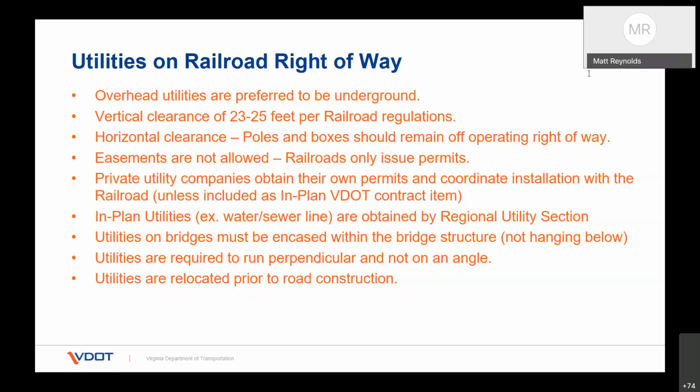until Norfolk Southern relented and gave us an exception in that case, but made it clear that we would never be able to relocate a pressurized pipe or any other utility without encasing it on the bridge structure if it's crossing them. And same if you're going underneath the railroad, of course, you have to jack the pipe. They're not going to let you open cut the railroad, which we have received several inquiries about open cutting rail.